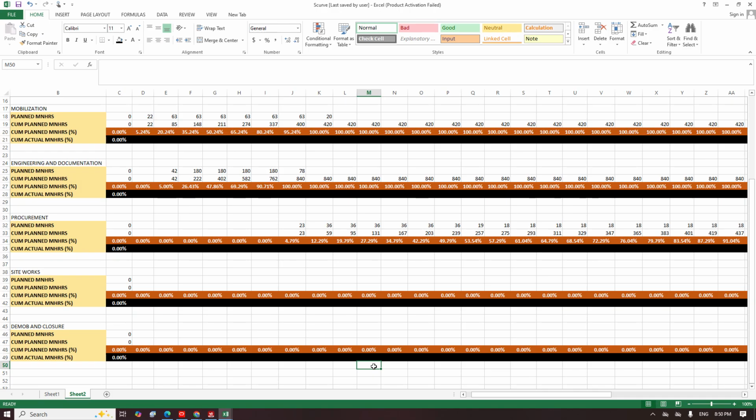You can even start using a calculator to plus each of the values, right? But Excel has a feature that helps you to get those things by just selecting them. It gives you the sum, average and also the count. And that's the one I'm using. So instead of summing it separately to know the exact value, I just look at the taskbar, take the sum value, know the difference, and add the difference to the plan value. It will normalize to 100.